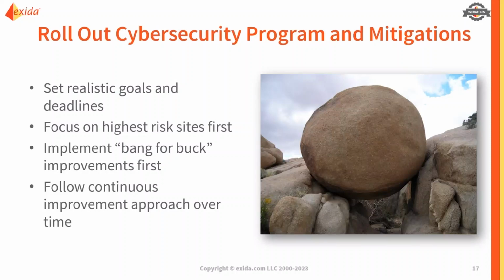And I've seen it very many times where companies have an assessment, they realize that where they're starting from a cyber posture is maybe not where they hope to or expected to be. And as an outcome of that, they've got hundreds of recommendations, hundreds of actions, and they're trying to get everything done in a week or a month. And a lot of times we don't build in the time or the resources that are really needed to put in the work and get these policies set up or to make the organizational changes or the implementation of the right controls. And so understanding that this is a process that takes time is critical. So that's something that is really important for goal and timing setting.